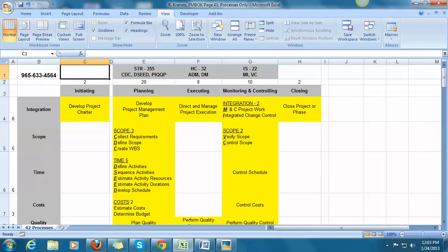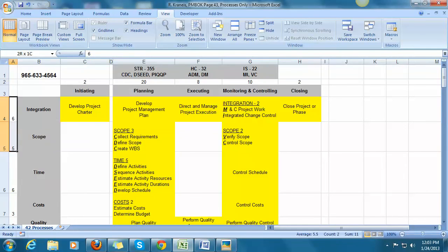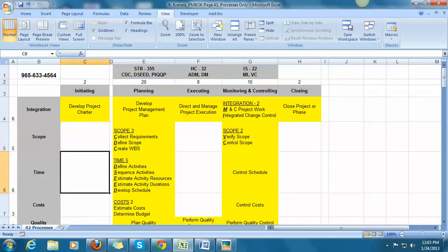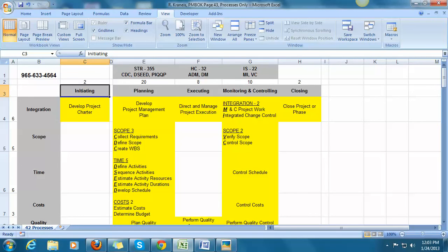And I know that going left to right across the top, with my eyes closed, I know that it is initiation, planning, execute, monitor, control, and closing. So I know where it is going across the top. What I think is really useful is learning the numbers going down the side and learning the numbers going across. You certainly need to know that for initiating it's 2, planning is 20, executing is 8, monitor and control 10, and closing is 2. If you don't know that, you better start learning it.